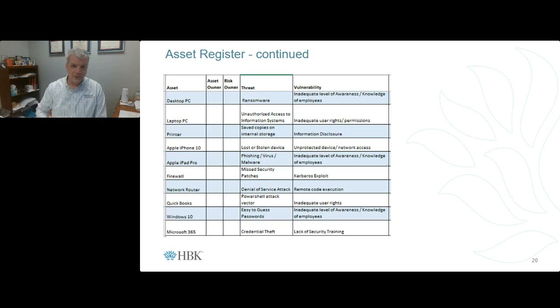So the second step after you have your inventory is you want to be able to identify where your risks are. These were two of the key terms that we defined. You're going to want to figure out what your threats are and then what vulnerabilities you have. It's a very straightforward step, but it's probably a time-consuming step. And so what I've done is, you'll see I build out my risk register a little bit further by putting in the threat and the vulnerability.